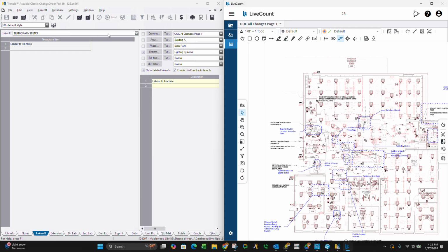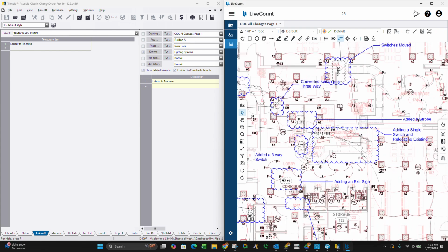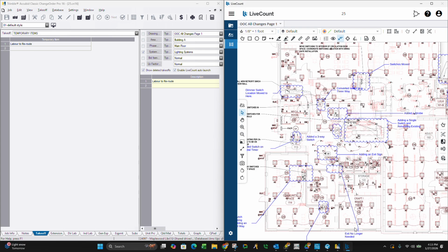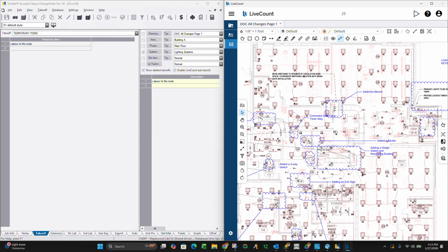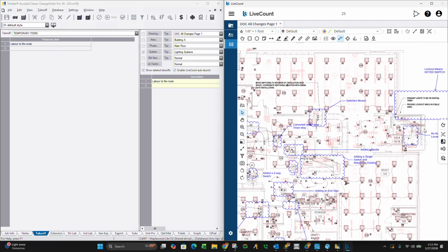Accubid does have the function, if you have your vendors signed up to it, to actually send it out to the vendors to get a quote, and it can produce a quote sheet that you can shoot out at the end of it to get quotes on all the materials. So Turner is a big one that does that.